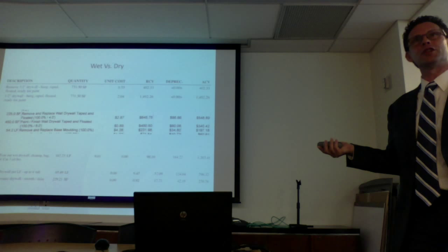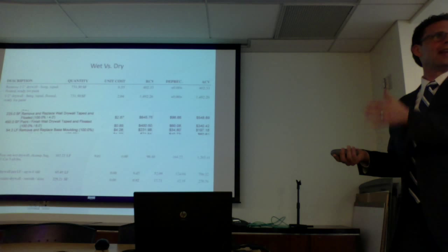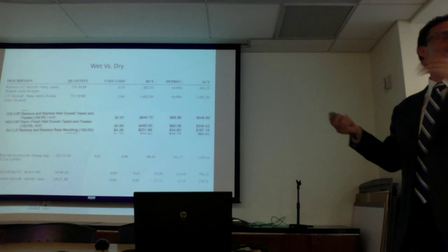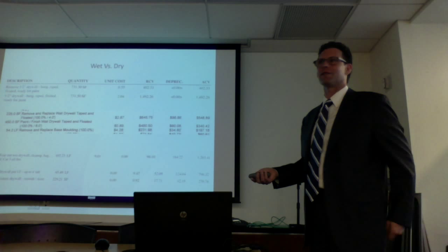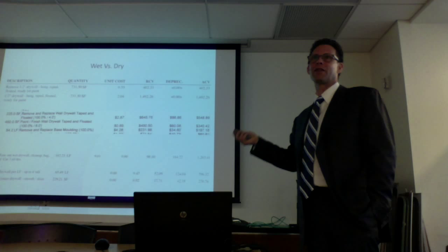Xactimate also says to you, when you do a flood cut, that your new drywall is really smooth, and the drywall that you didn't replace may have three or four layers of wallpaper, may have been painted 40 times over 70 years. So they tell you to use DRYTXT to do a smooth skin coat over the new drywall or over the whole wall to get a consistent finish. FEMA pays for this. They do pay for it. I know they pay for it. I've gotten paid for it.